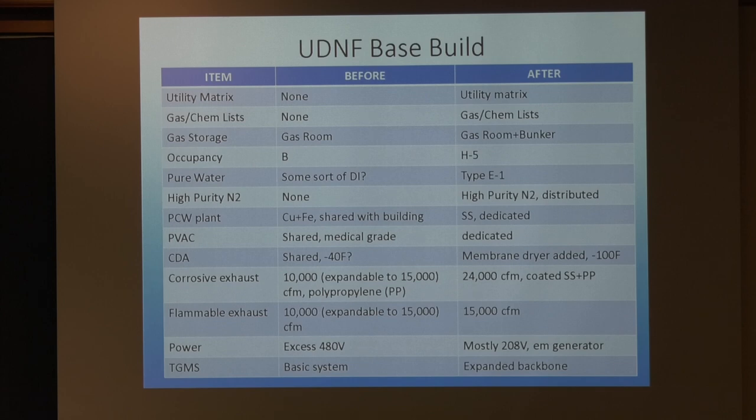The process cooling water plant was shared with the building. It was copper, but there was a lot of iron in the components. And one of the screw-ups at the University of Pennsylvania was the process cooling water system. So I knew there is no way we can allow iron in our process cooling water system. So now I have a dedicated system. It's stainless steel, and my piping is CPVC. Dennis mentioned CPVC, and in a way that kind of makes me nervous. My system has been operating for several years, so it seems to be okay.